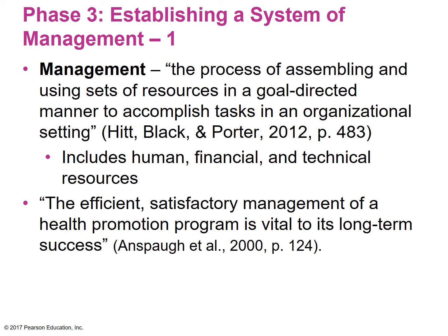Financial management, right? You've established a budget, and maybe you were funded specific to that budget. Well, if you're not sticking to the budget, things are running over in terms of costs. That's going to be problematic. So the sooner someone's able to identify that this is happening, the sooner you can respond to it. So having someone that's going through the receipts and looking at the balance in the account and managing that.